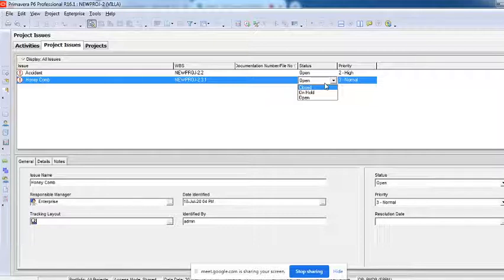this happens usually with my Middle East clients. When these clients generate reports using their login IDs in Primavera, any issue which is open will show in the report. Automatically it comes into the report that this issue has been there and it is open. They will not go to the next step of discussion at all. The project will not go to the next step until all the issues are either closed or on hold, but issues cannot be open.